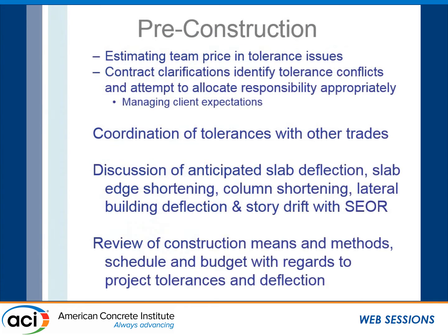So, like I said previously, our estimating team needs to price in tolerance issues and contract clarifications to identify tolerance conflicts, and attempt to allocate responsibilities appropriately. And really what that means is managing client expectations. Coordinate tolerances with other trades.